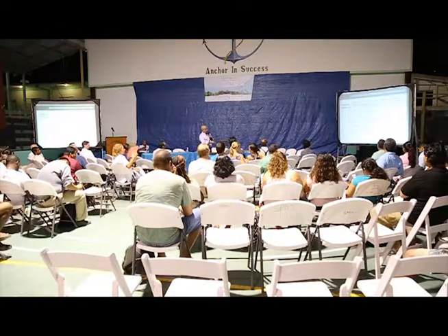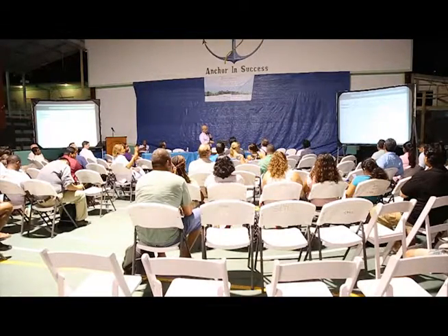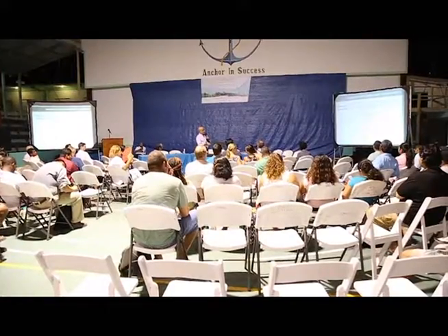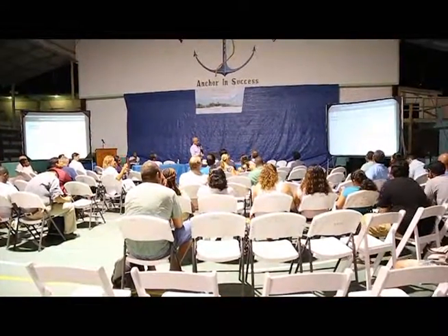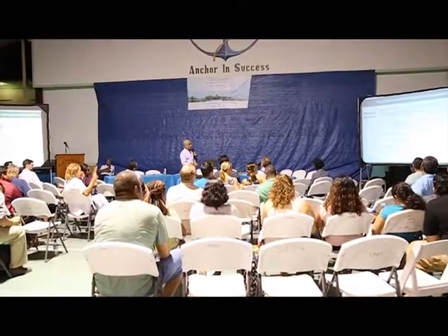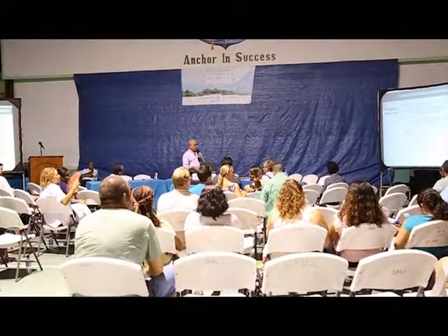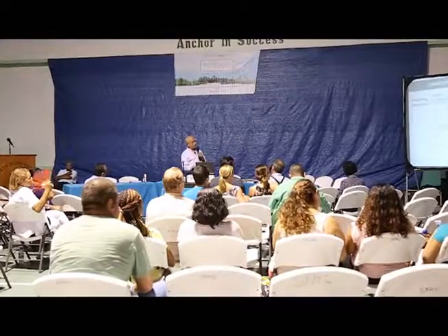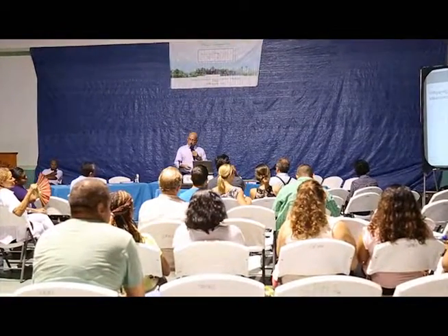The 5 major potential disasters that have been identified as possibly affecting the property and operations include hurricanes and tropical storms, fire, fuel oil spills and leaks, medical, and sea level rise, and they will each have their own individual response plan specific to that disaster.